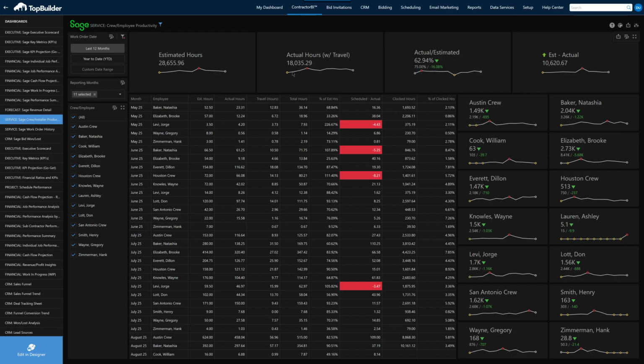And I'm looking at it saying, okay, well, look, we estimated 57 hours. We had 12.24 hours of actual time on the job. We had 6 hours of travel that needs to be figured in there. And then we have a delta of, we made money at 38, actual of 38 hours under budget. And then we have some that we went over budget.